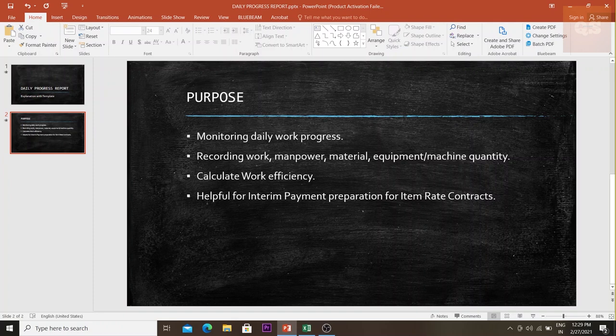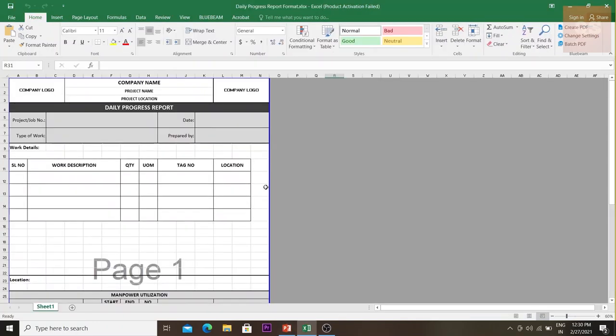Using the marked-up drawings, I could submit substantiation with my interim payment application to the client. This sheet was also very useful for the planning department to understand how many man-hours had been utilized to date and what equipment, plant, or machinery hours had been used. I'll now show you the template I used in my project so you can get a better understanding.